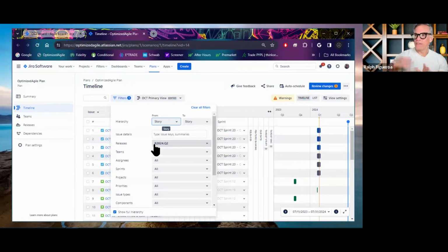So if they have a dependency on another team that is using, for example, Version One, they create that issue type, or that ticket, in Jira to reflect this work that needs to come from another team that is not using Jira, and that way they can track it in their plans. So Jira will support custom issue types, and that's the theme that I'm trying to relate.